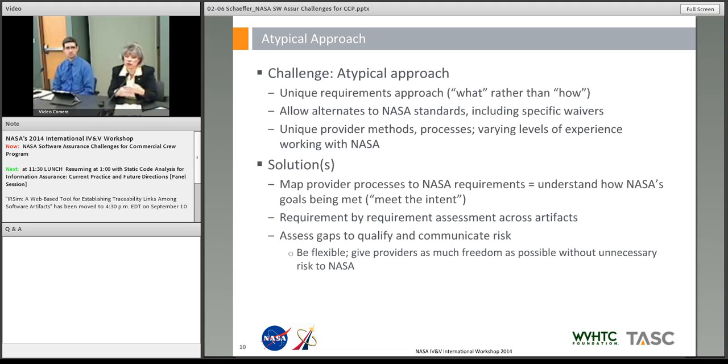The next thing we did was to prioritize. We decided that anything that was focused on crew safety or that was related to risk became primary. Those were the primary requirements. We really had to do a good job and focus on those. That didn't mean we left everything else out. It just became secondary. And when we had time, obviously, we looked at all of those.